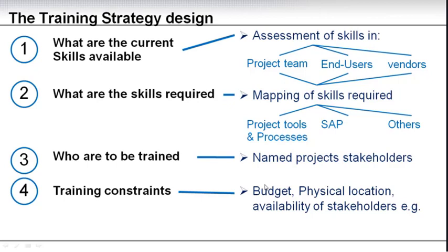Then the backfill team would attend the job function, answering the phone, doing the process, whatever needs to happen, so the people could be released from the training. They could have a clear mind, focusing on what the training provided for them, and not be worrying about their day-to-day job, and thereby not pay attention to the training.